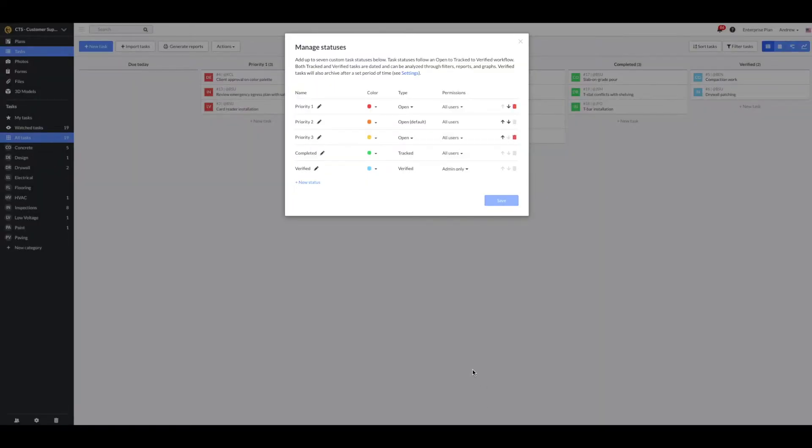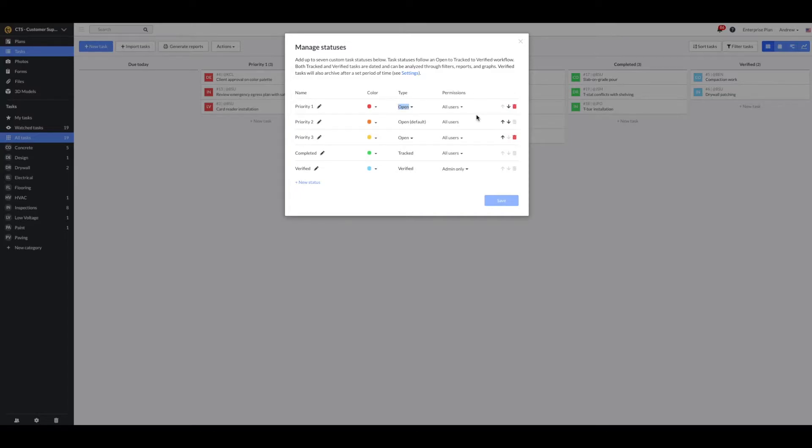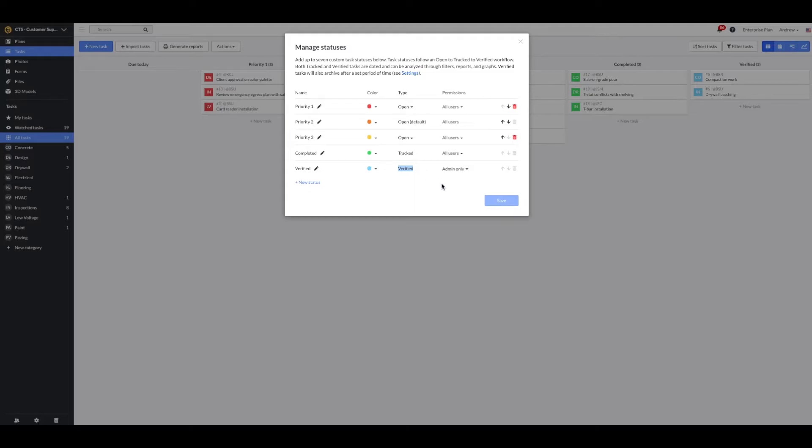One key thing to note is that custom task statuses will follow an open, to tracked, to verified workflow. A verified task cannot come before a tracked task. A tracked task cannot come before an open task. You will need to have a minimum of three task status types, but can add up to seven in total.